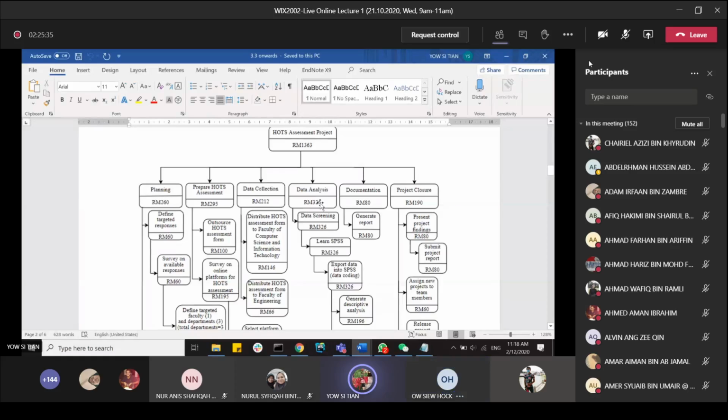But eventually I also have to change this, right? So that comes the change management. You see, some students ask me what is change management. So you estimated this. After that, you realize the risk event will happen. So you make a change now. You go and re-estimate. So your change management comes in. Okay. See the full picture.